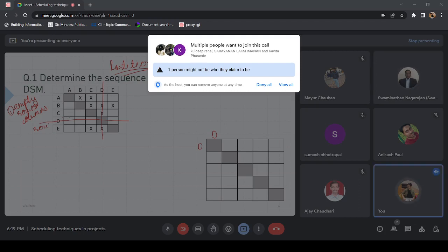I hope this is clear to everybody what we are doing. We did the same thing in case of Fulkerson's rule also. Once we number one event, we would forego all the relationships going from that event and move on to whichever event doesn't have any incoming. Similarly, here we determined that D can be executed first. So crossed off D. Now moving on, is there any activity with empty columns, empty rows? Yeah, it is C. So that brings C to the second.